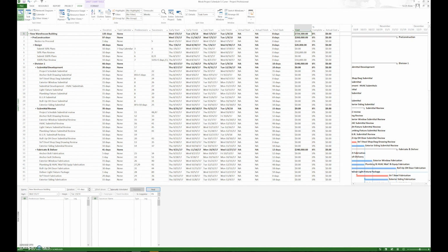No matter how we do it, even if we go methodically step by step through every individual step, we're going to miss something. It's inherent in our nature. There's going to be something that goes wrong. So when we do a spec review or a final review, we want to go through and look at each individual section. I encourage people to go step by step, putting in a task, and then durations, and mandates, and predecessors, because that helps us keep the same thought process as we go through the entire scheduling sequence. So that covers step number 15, spec review.